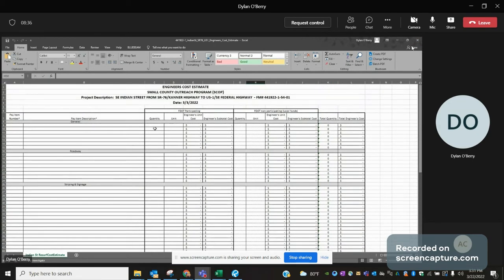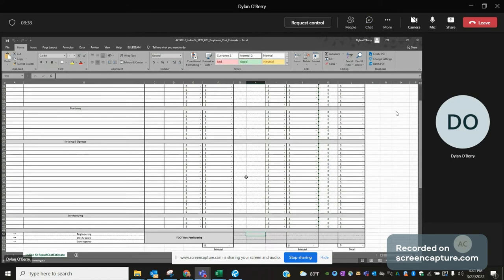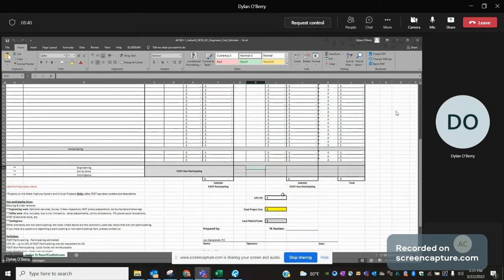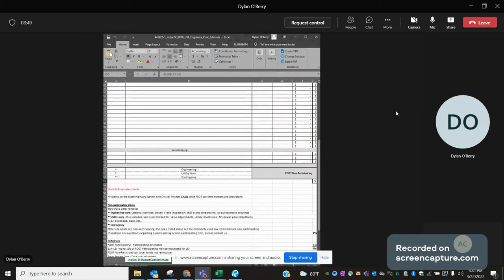So, we're just kind of reformatting the estimate, and it should come up when you look at this total column here. It should come up to the same amount as what you have already. Okay. I'm gonna just copy and paste and see first. Yeah, we got 1,000,000.1071 is the total. There's a 10% contingency. There's a contingency column here. Utility work.